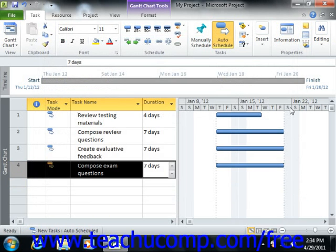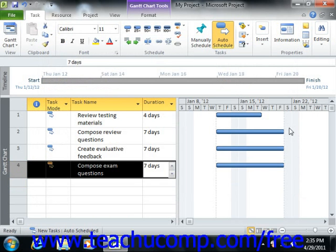For example, if you selected the standard calendar when you defined the working schedule when creating your project, any tasks that are scheduled will only be scheduled during the Monday through Friday 8 a.m. to 5 p.m. schedule defined by that calendar choice.